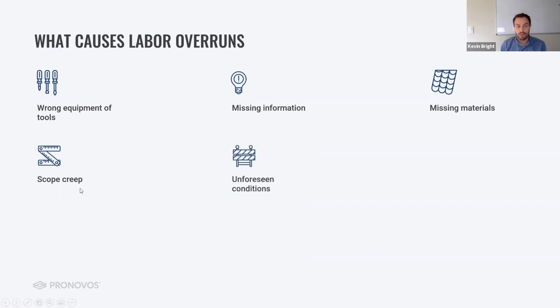The next one is unforeseen conditions. I think the one that immediately pops in everyone's mind is weather delays, or just weather impacting the quality of the site. If it's muddy out there, you're having to spend a lot of time doing dewatering or other tasks. That can really slow down your overall production rate and make everything less efficient. However, it's not always just weather. There can be other things that you may not notice right away.